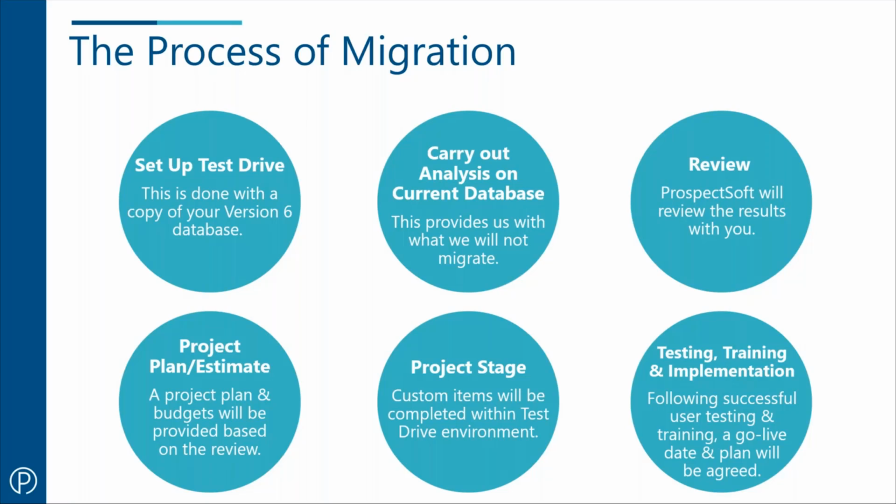So it will give you a chance in what we call the user acceptance testing stage, where you at some point will come to the end of the testing and say, no, these things need to be done, and we review the feedback and do some changes and so on. Or we get to a stage where you're happy to then proceed and actually book in a migration date. From that point, we will run the new test drive from your server, which will indicate how long the actual migration process itself will take.